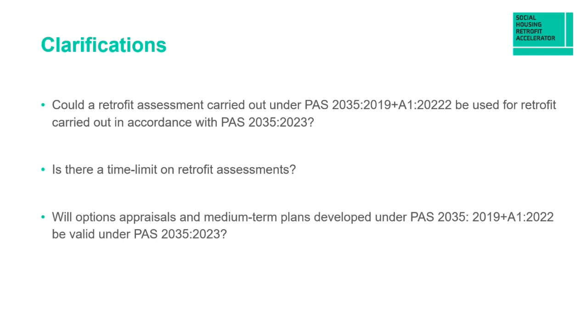Is there a time limit on retrofit assessments? No, there's no time limits for retrofit assessments for SHDF. There are 6-month time limits that were introduced as part of the ECO scheme, so that may be something you're aware of, but that's just due to the specific requirements of the legislation that underpins that ECO scheme, and certainly does not apply to SHDF projects, so there's no time limit to the retrofit assessments.